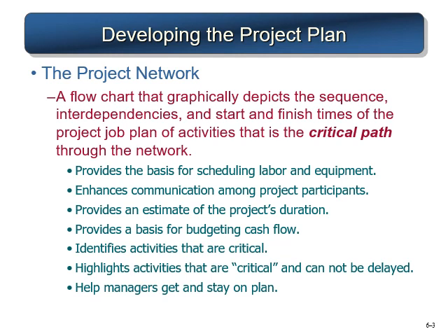A path is a sequence of activities which are linked with one another from finish to start. So one activity finishes, the other starts. There are sequences of activities which get started from day 0 and end at the end of the project. That's a path, and the critical path is the one which has the longest duration.